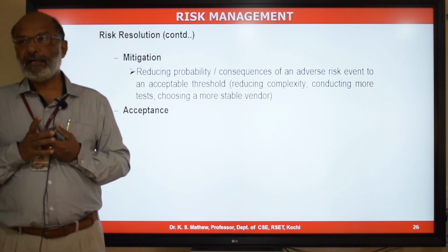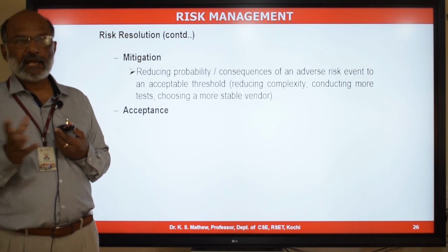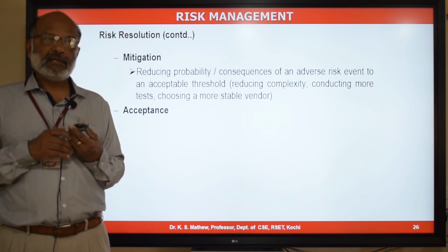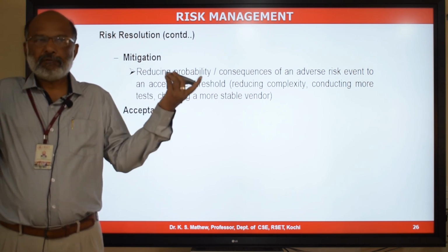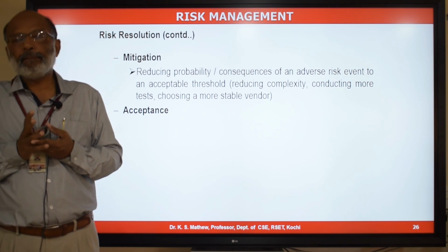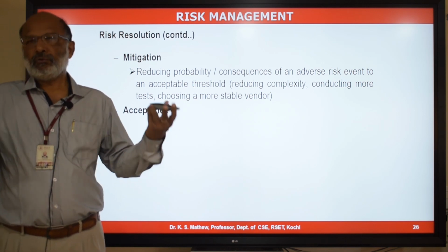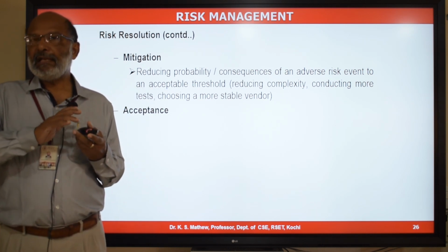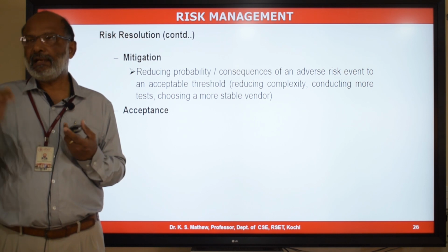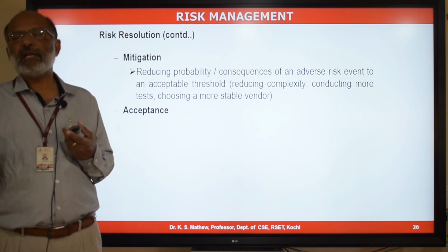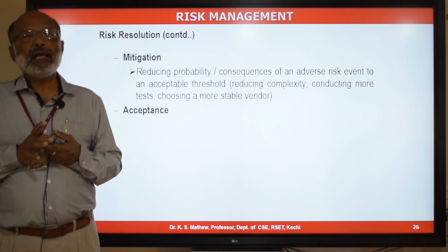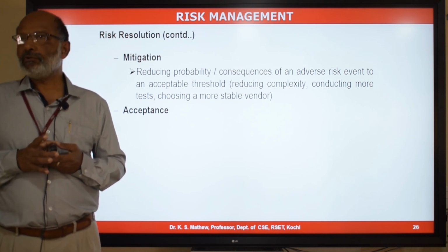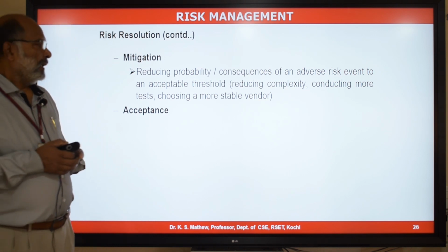And you will plan some contingency reserve in terms of additional time or buffer time and buffer budget to address those risks which are accepted, either because you don't have control over them and you cannot plan anything to control that, or because they are of low priority and you accept them. And also, after taking some mitigation steps, you will not completely eliminate that risk. You will only reduce the probability and reduce the impact, but still some risk will be remaining. That is called residual risk, and that will normally be accepted by the management. And for addressing that residual risk also, you will plan contingency reserve.